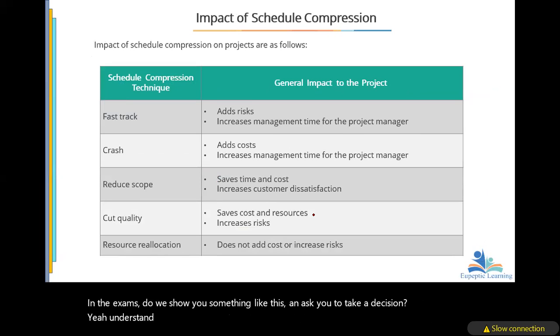So what is the impact? Like I said, fast track increases risk, and then it increases management time for the project.